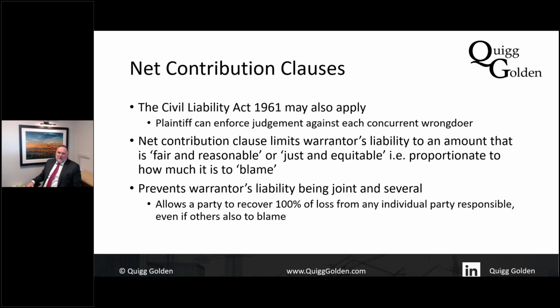So it's important you ask for a clause to be in there saying that your liability under the warranty is limited to such amount which is fair and reasonable, or just as equitable and proportionate to the amount it's to blame.